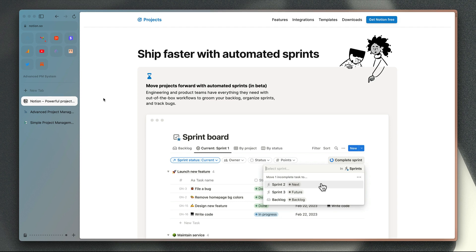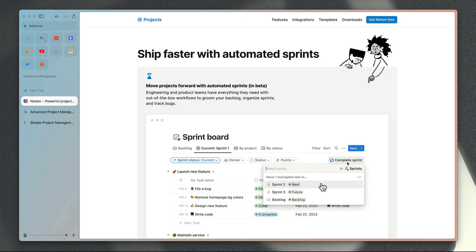As you've probably already seen, Notion has just launched some brand new project management functionality, which introduces some really useful features if you work with sprints in your Notion project management system. The good news is it includes functionality like this button here, which allows you to click a button on your task database and mark all of your tasks as complete in the current sprint or move the incomplete tasks to the next sprint. The bad news is this functionality is currently only available in the databases which are included in the new templates which Notion has created, featuring some enhanced databases with these features.